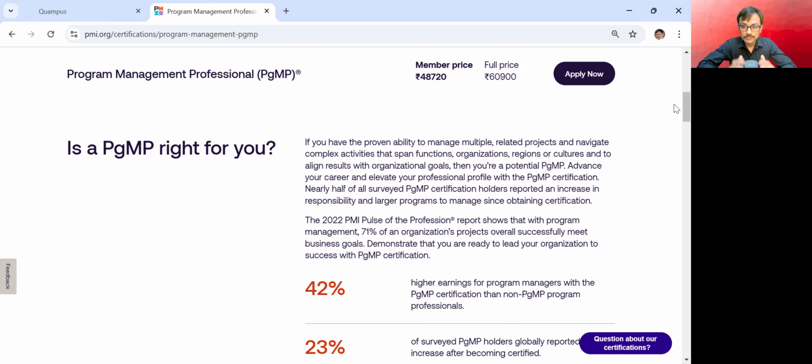The program manager role is more about managing the outcome which is coming out of various projects and ensuring the desired benefits and value get achieved at an organization level. Practically, dependency management, interdependency management, and escalation management are usually more associated with program management, rather than getting with the team and resolving issues at a one-on-one level. So as a program manager, I may not interact with the team members and help them in fixing a particular problem, but I might be working with the project leaders, project managers and others, ensuring stakeholder engagement, benefits alignment, and that the overall strategic objective of the organization gets achieved.